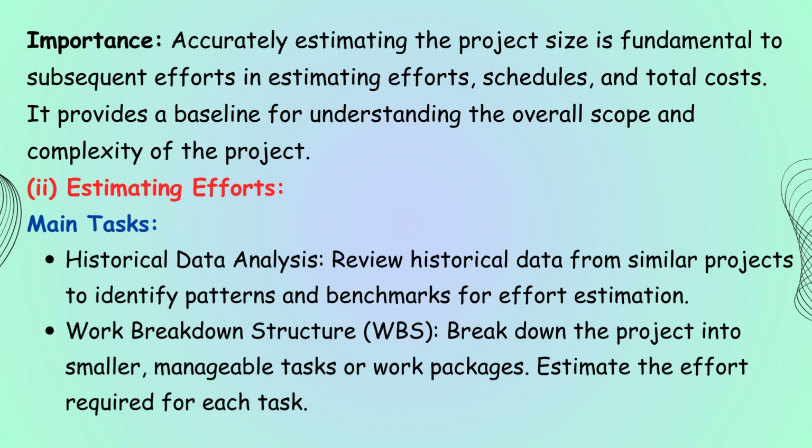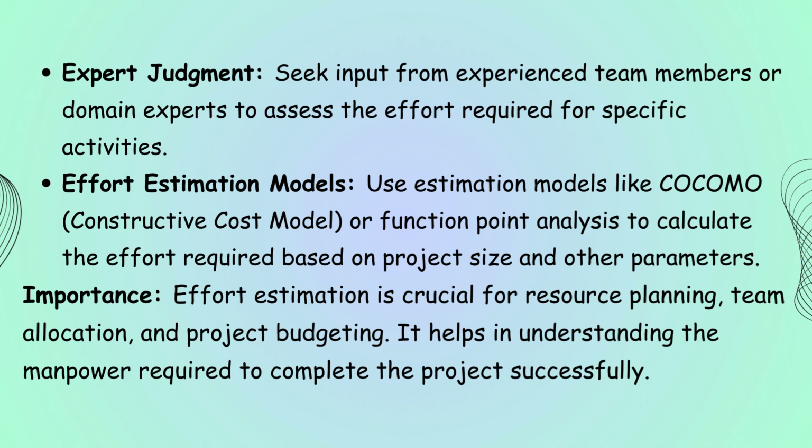2. Estimating efforts. Main tasks. Historical data analysis: review historical data from similar projects to identify patterns and benchmarks for effort estimation. Work breakdown structure, WBS: break down the project into smaller, manageable tasks or work packages. Estimate the effort required for each task. Expert judgment: seek input from experienced team members or domain experts to assess the effort required for specific activities.